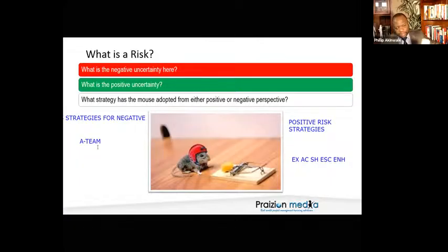What's that? Active accept? Accept? The safest answer is accept, my friends, because you do not know what Phil is going to do with that. You don't know whether he's going to use it. In fact, a very tricky examiner would say it's passive accept because you haven't been told anything that would generate action. So if the passive accept answer is there, I would go with that. Because if it doesn't say sending a team member out to gather data to reduce the possibility of occurrence, it's accept. And if we don't know that Phil is doing anything with the data, it's as passive as can be.